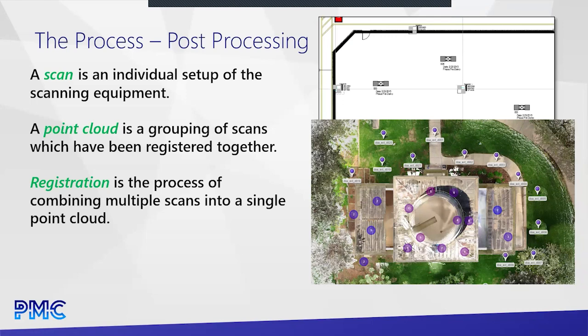So you won't go from scanning on site to a point cloud in your inbox in an hour, right? It depends on the size of the project. This could take a day for something small, like this image shows on the screen. This would be post-processed in a day. To the largest projects we do, you could be talking about weeks or even a month before you actually get the final scan data published out.